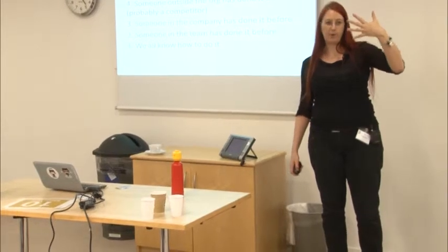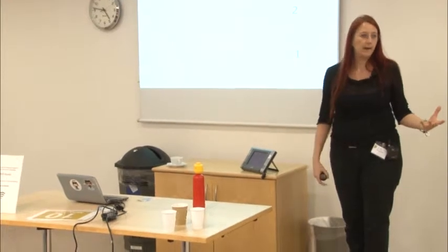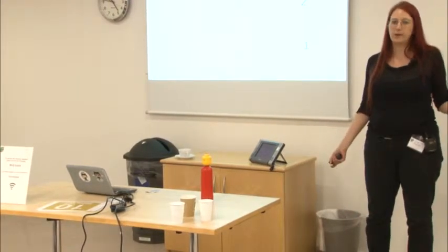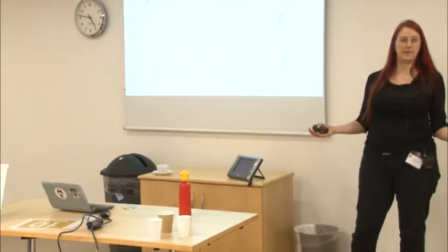So on that 5-point scale, you can probably see fairly easily how it maps. Over in the 5s and 4s, if you try to analyse a thing where even the business hasn't done it before, you'll end up in what we call analysis paralysis, and you'll hear people thrashing around the argument, trying to decide what the right answer is. Whenever you hear that, if they're familiar with this, you can just say, well, look, this sounds like something we've never done before. Can we try something out and get some feedback on it instead? Can we create an experiment? Can we create several experiments?